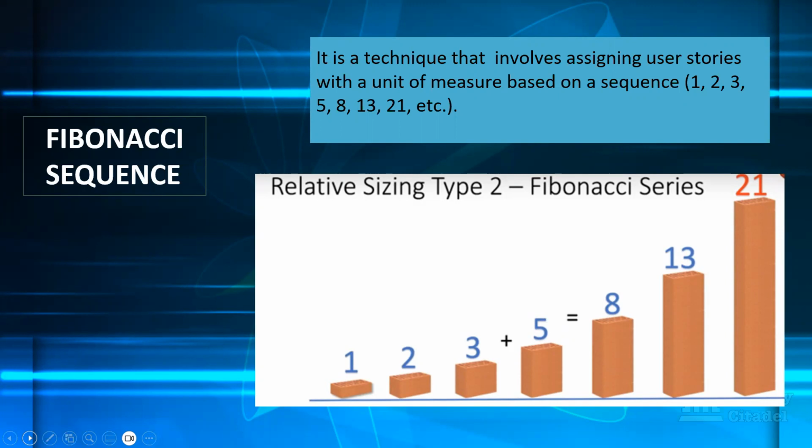So it could be broken down into two, to have just login and remember my login details to be one story, and then forgotten password to be another story entirely, because it has its own process, which is quite different. So that's how you break down stories when they are too big, and then be able to look at it and agree together as a team to do that.